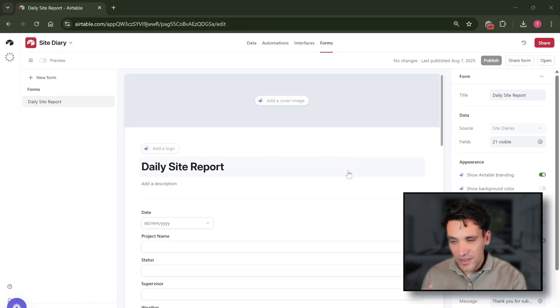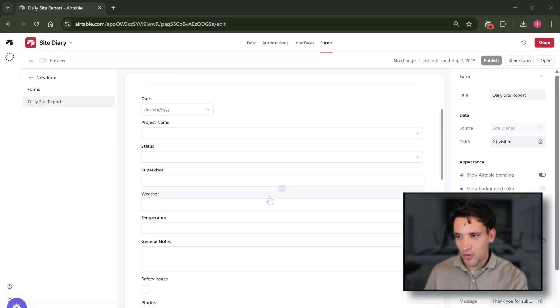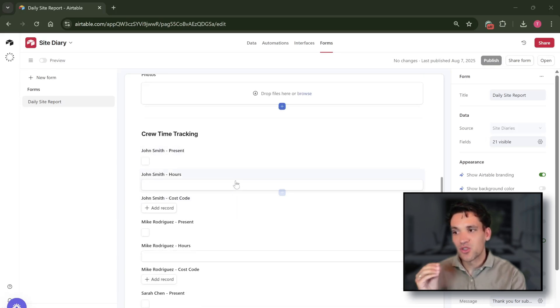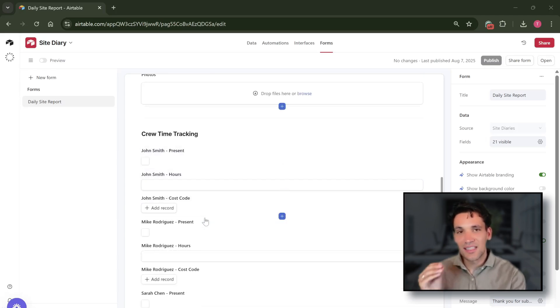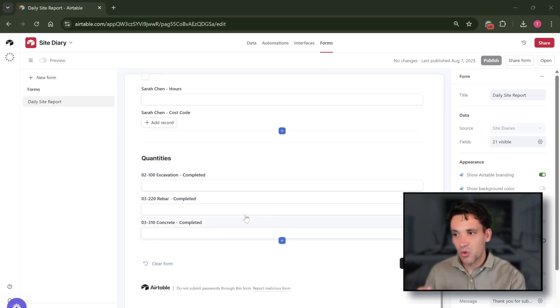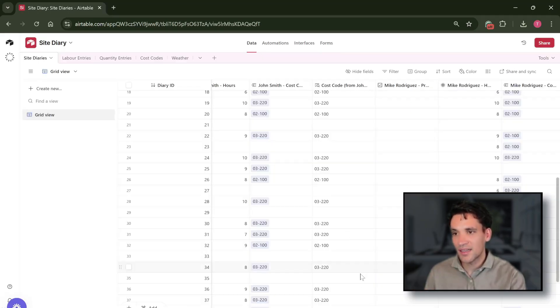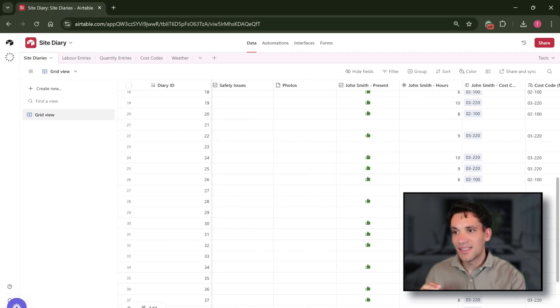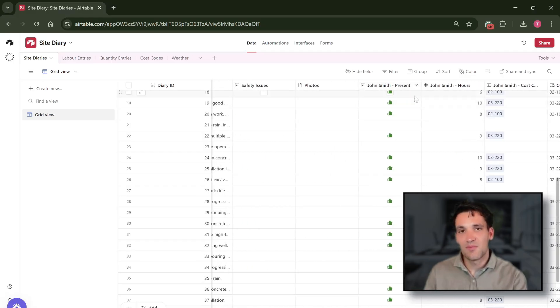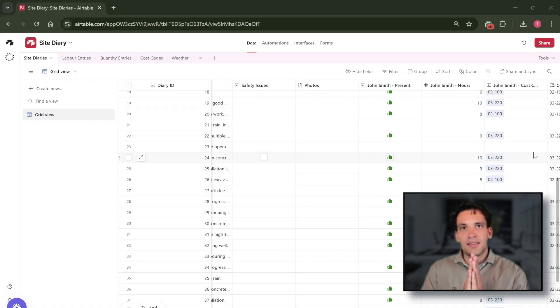In our specific daily report, what we're capturing is general project information and then we're tracking the hours of everyone working on the project against a specific cost code, and then we're tracking the quantity of work completed. So if we go back to our site diary table we can see there is a field that matches each of these entries in the table.